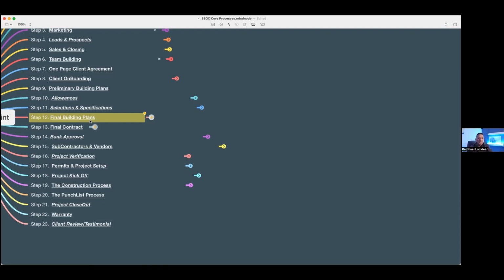Granted, they're not happy. However, when you as the builder go back and say, well, hey, we agreed that we were going to do it per plan, per spec, and we show the pattern here on the flooring layout sheet that we all reviewed in the office, and we record all of our meetings, by the way. So anytime we're meeting someone, reviewing plans, it's documented, we talk about these things, and we let them know, hey, is there anything that needs to be addressed on this particular set of plans?